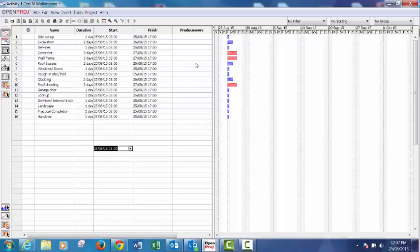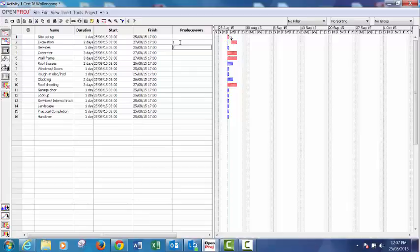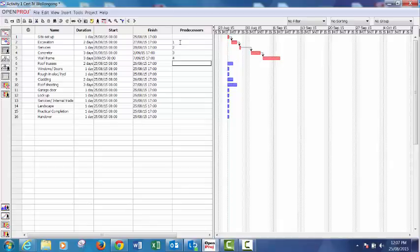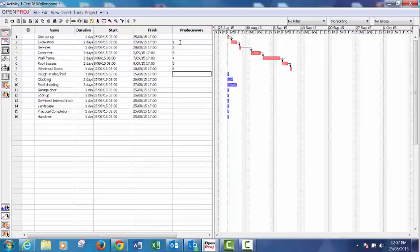Okay, so that's the first step. Then we put in the predecessors: one, two, three, four, five, six. Then we've got rough into electrical and hydraulic off of the roof, so that's a six again. That's for roof sheeting.